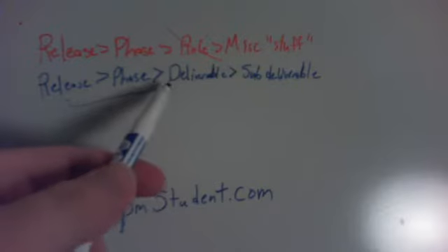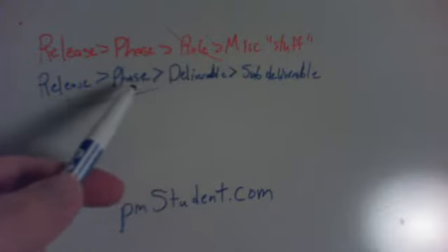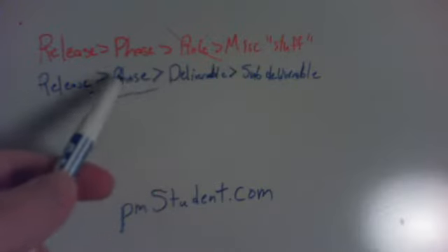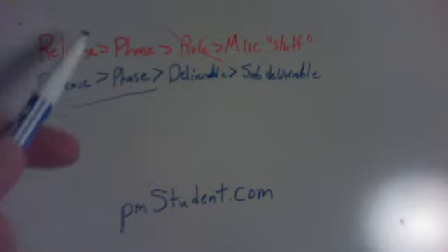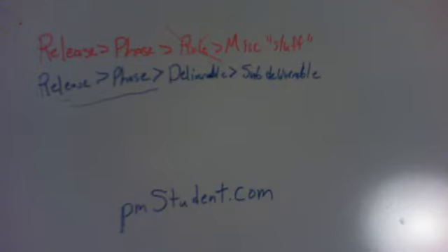And if you know from WBS Coach, phases are something that I also have a problem with, but really only at the highest levels of your work breakdown structure. So again, this is probably level 4 or 5 in a very large, complex project.